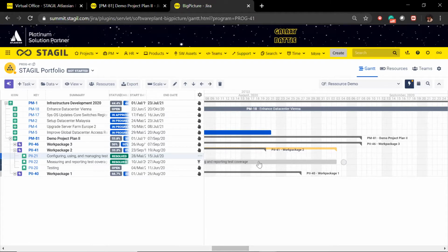One thing that will appear then is that there is a critical path in this task, created by the fact that we have postponed the starting dates. This gray line suggests the original end date of this milestone, and the orange one is the expected end date because we have moved our tickets. So this tool, together with the project management, is a tool that can be used by team leads and supervisors to monitor the activities of their teams and the progress of their projects.